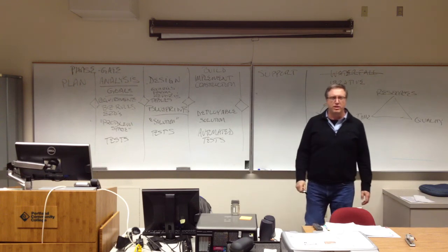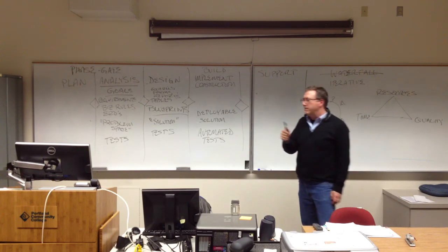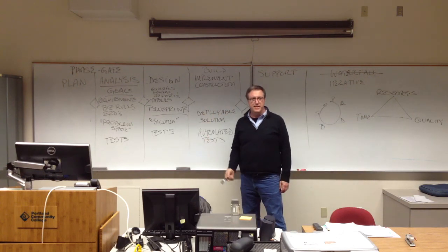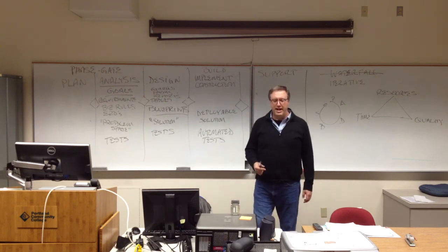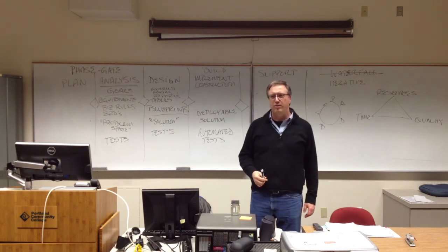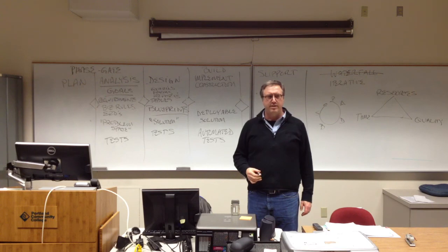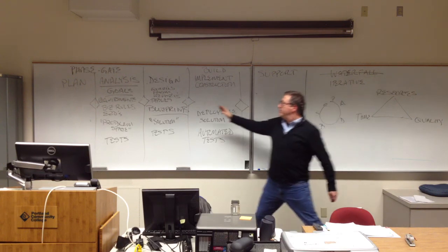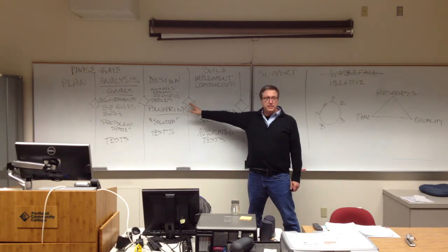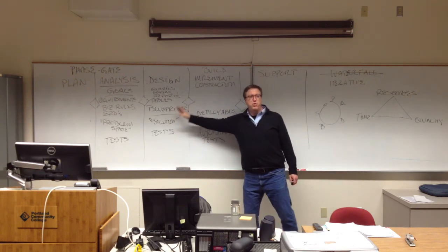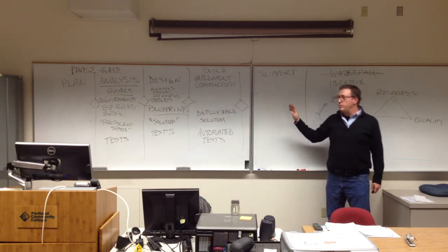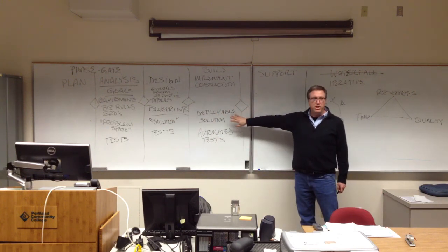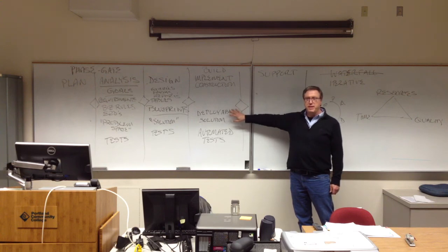We never sold one. And you might think to yourself, a smarter company would have seen that recession coming. Or a nicer customer would have told us, oh, you know, we're probably not going to want to buy that. We didn't know. So anyway, it is better to stop a project earlier, because you spend more and more money as you go on. We had tooled up, we had a factory, we had all sorts of stuff in place. We had spent millions of dollars ready to make that printer.